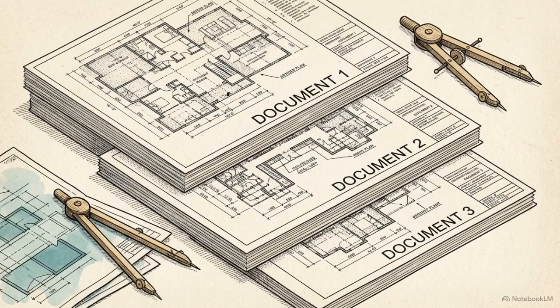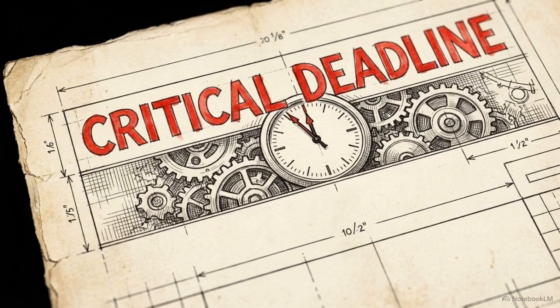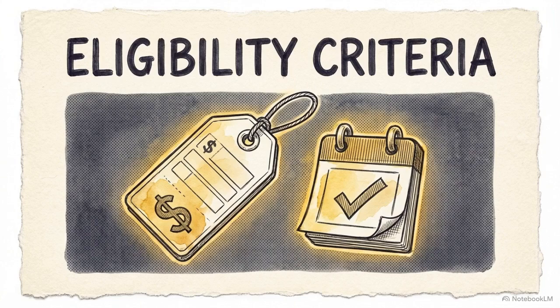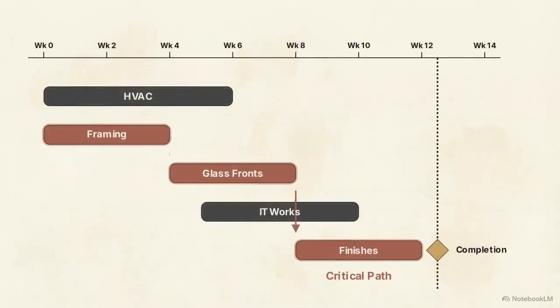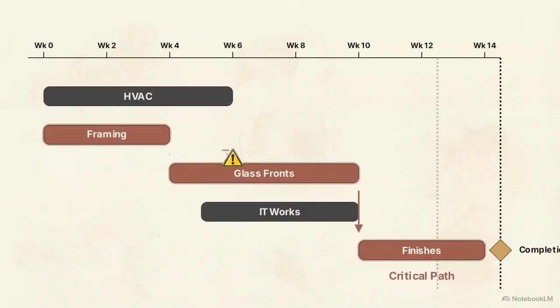Paste these templates for the CE notice, the CE register, and the quotation request into your toolkit. Keep the 4-week time bar prominently displayed so your team never misses a deadline. Under Z Clause Z13.1, you are only entitled to changes to the prices or the completion date if you can prove the compensation event directly affects the project's critical path.